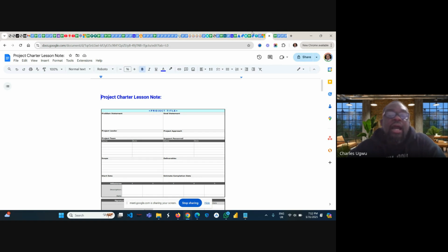Okay. High-level project plan. If you capture this, it's important, but it's not that compulsory. Major milestone and estimated completion date, high-level overview of the project schedule, budget overview, high-level estimates, it's just an estimate of the project cost, resource that will be allocated to the project, assumptions, risk, and constraints.